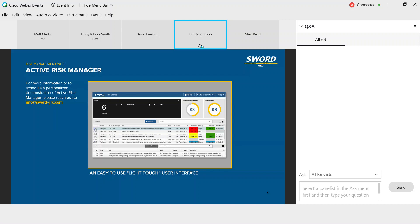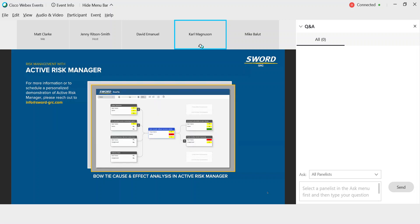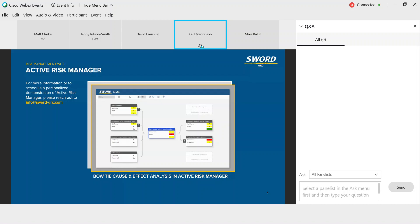When those risks and opportunities are raised, we want to give them the appropriate level of consideration, including escalation or transfer if necessary, as soon as possible. The sooner risks and opportunities are identified, the more flexibility there is to address them, and the less it will cost to do so. We also want to make sure that technical impact categories and quality are part of the risk assessment criteria, and we want to monitor quality throughout the process. Using techniques such as Bowtie Analysis, FAMIA, FAMICA and Six Sigma to identify root causes that can trigger other risks is a key element of success here. As you can see on the screen, Active Risk Manager allows you to perform cause and effect Bowtie Analysis to help you identify not just the risks and issues and opportunities, but their related and individually analyzable causes and consequences.